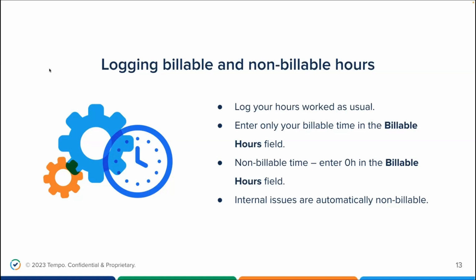So in addition to billable work, the team may also need to log their time to non-billable issues related to the contract. For example, the environmental team at the Apollo Consulting Group needs to do some training on lunar environmental practices, but they aren't billing Lunar Industries for this time because it's knowledge that they will also use for other clients. The way in which the team logs their non-billable hours depends on whether the Jira issues have been configured as internal issues or not. I'll show you how to deal with each of these in the demo, which I will start right now.